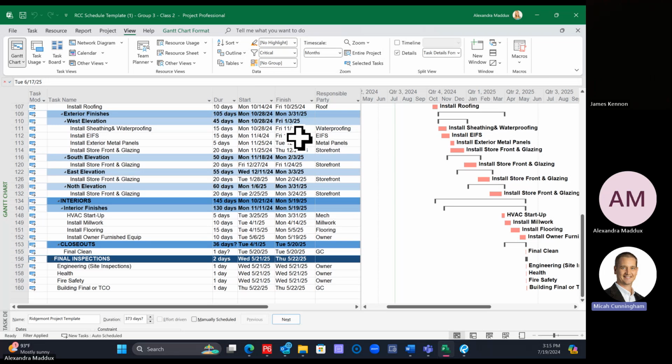As you encounter that weather day, it'll either make a task take a day longer or I'll add a weather day where it happened and then take it from the bank. Weather banks are nice for certain projects and then other ones I've seen where it's just not helpful. Or if it has a bunch of turnover dates, then it's harder because you have to have weather banks for each turnover. So it just depends.